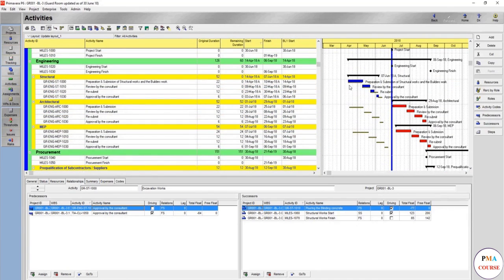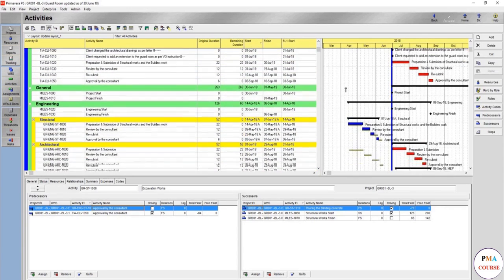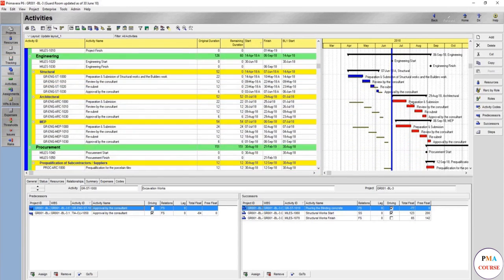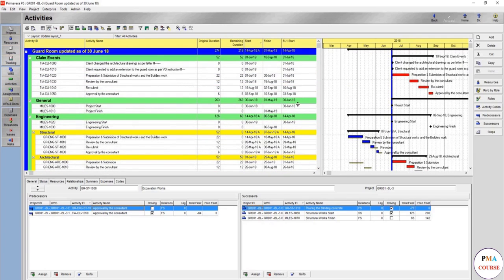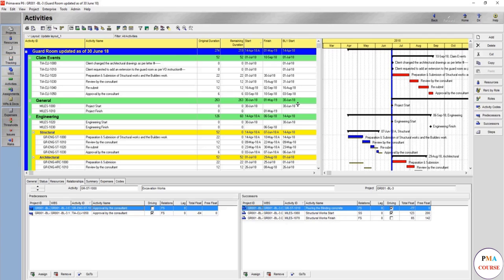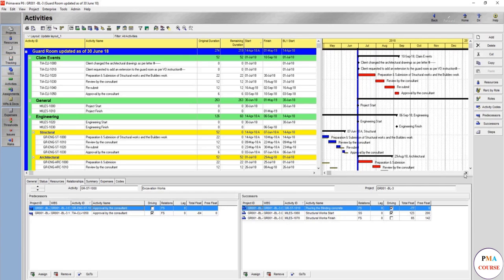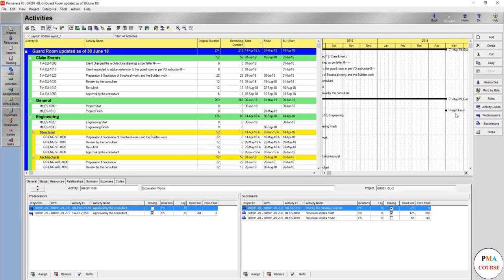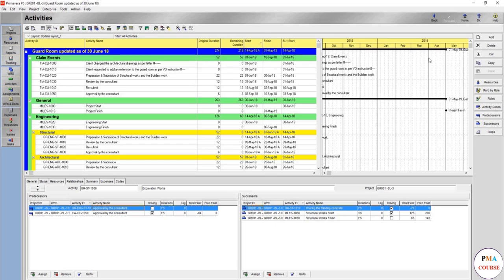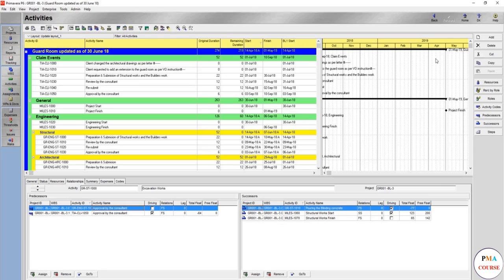So in such case, most probably, you have to check a lot of documents that this is for sure an excusable delay, but is it compensable or not? That means, are you going to get paid for extra time staying? By meaning what? By meaning if you are going to stay in January, you are going to pay for stuff general preliminaries up to January only, but now you have to pay three months more. Who's going to pay for the stuff preliminaries for these three months? Is it you shall you incur as a contractor, or is the client shall pay you to compensate this? This is what's meant by compensable.